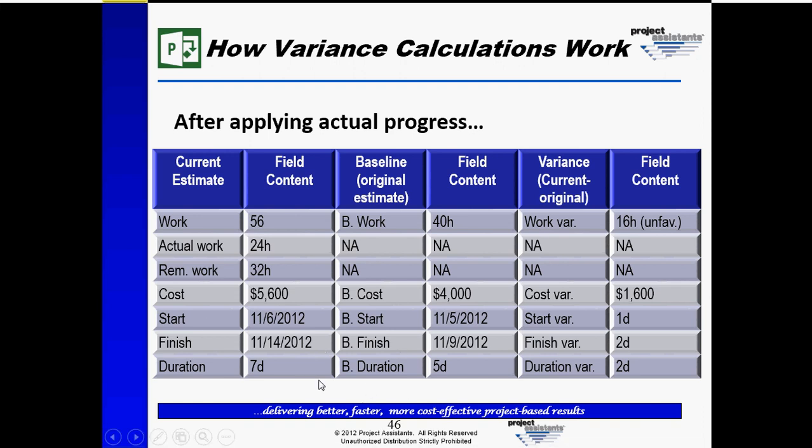The same is true for the duration. It was five days, now it's been changed to seven days, and there's an unfavorable duration variance of two days.